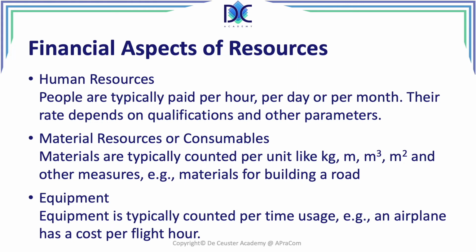Now, when we look at resources in general, we have to consider the quality or the level that we are using. For example, when we use people who are overqualified to do a specific job, we may pay too much. The same thing applies to materials or consumables: we may have differences in quality or grade in order to have a better solution. If we use a better oil or some additives, they may or may not be necessary. Here we can have a look a little bit at what we called gold plating before.